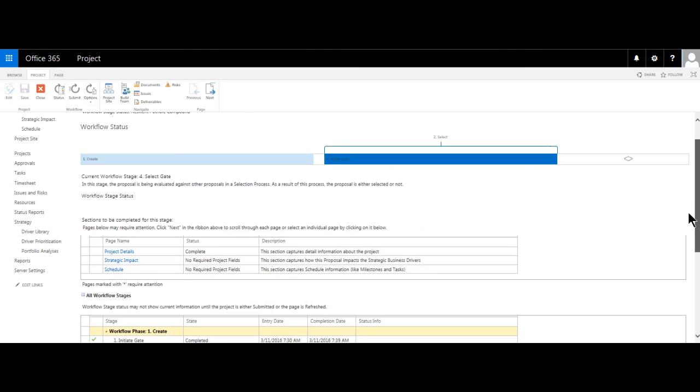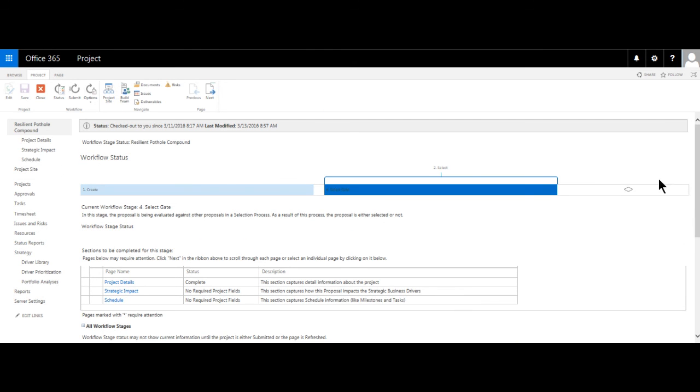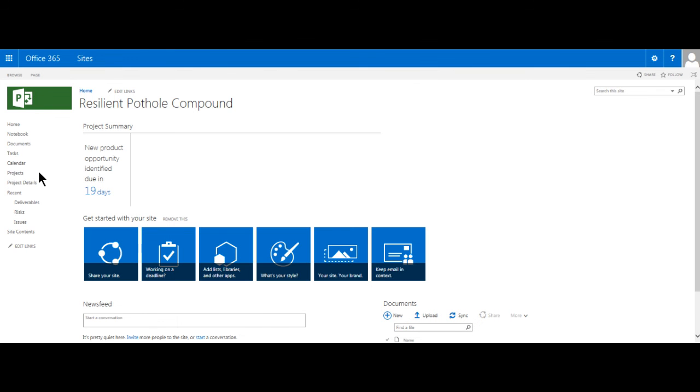Along with the schedule and other PDPs I've shown you, I'm also set up with a project site that helps to enhance my team collaboration experience. Enterprise project types such as the new product development choice we made at the onset determines the design and contents for this portal. Aside from storing things like key project documents, we can leverage this site to track risks, issues, communicate our key deliverables and their associated commitment dates, just to mention a few of the things that could be beneficial for a project.